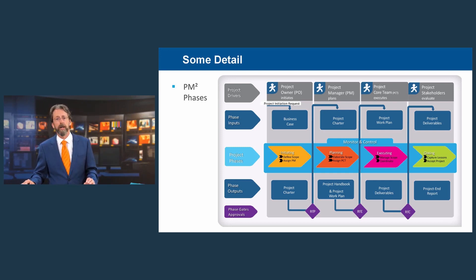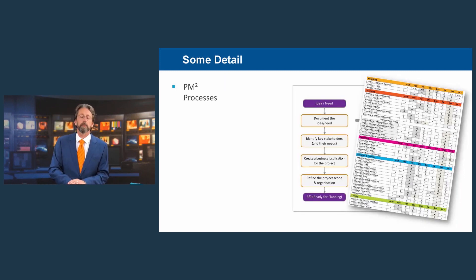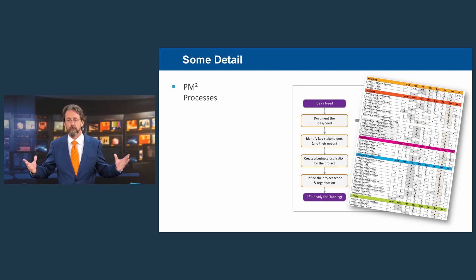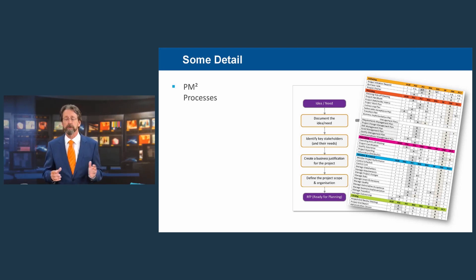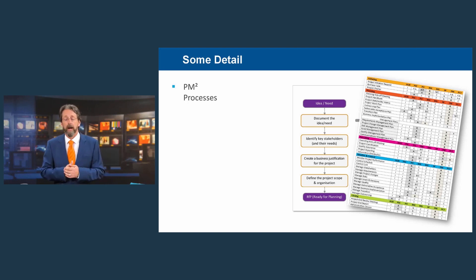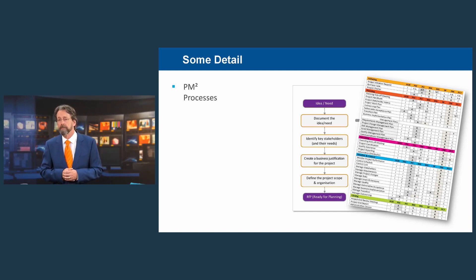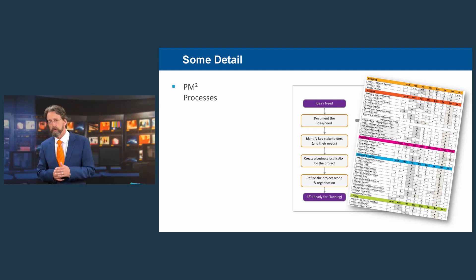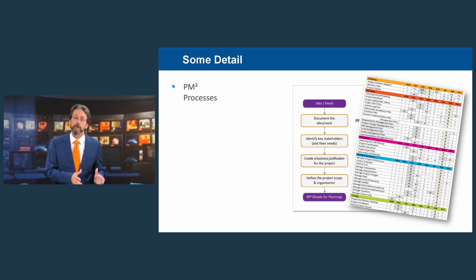The third pillar is processes. PM2 is a process model for running a project — you need processes for managing risk, for delivery acceptance, for managing quality, and for knowing who is responsible for doing what and when. PM2 offers, either in the guide or in the templates for various plans, detailed descriptions of possible activities to include in the management of your project, and connects those activities to roles from the governance model using a RASCI matrix.